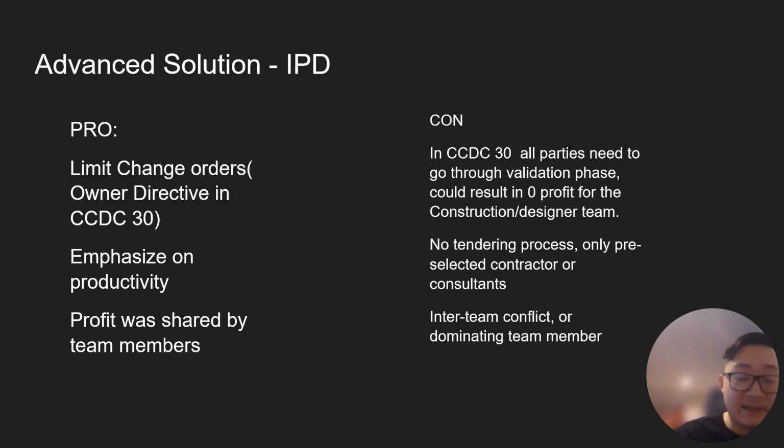That doesn't mean the owner has to accept the work that the construction and designer team put in. So virtually the owner could just walk away from it. At the end of the day, they could be like, oh, this is too expensive, I don't think I can spend that much, and walk away from it. And in CCDC 30, you are not allowed to claim profit on the validation phase, which will end up being a lot of work and zero benefit.